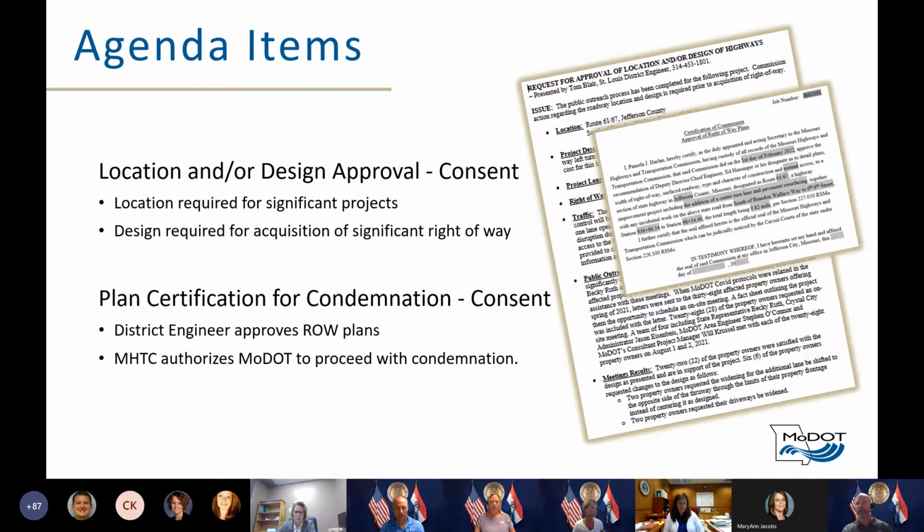Design approval is required for controversial projects that require substantial amounts of right-of-way. The backup should include a summary of the public outreach and results of public meetings and hearings. The backup should also document any controversy and indicate what actions are being taken to resolve those issues. Design approval must occur prior to request for condemnation.